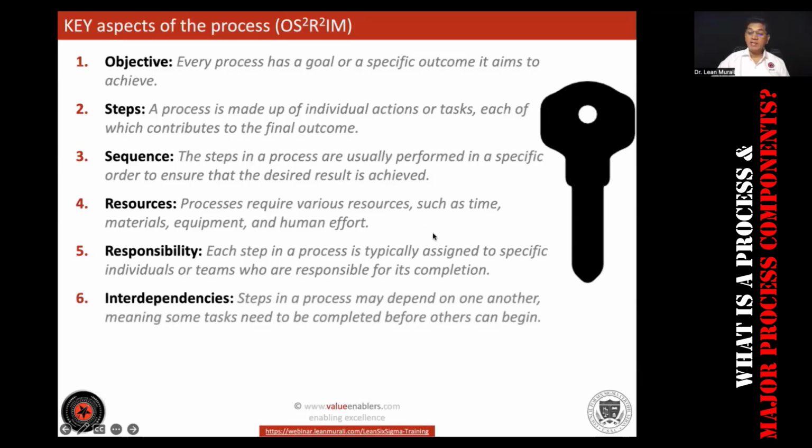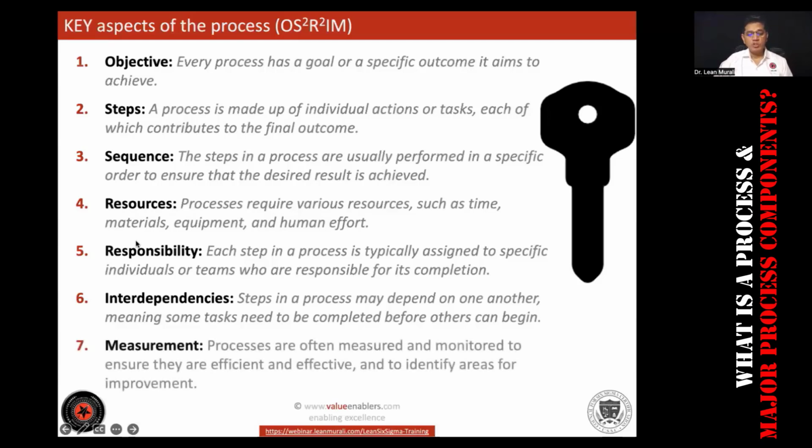completion. And interdependencies is a very important component because one step might be dependent on another. Some tasks need to be completed before the next task can begin. Like you can construct a wall only after the foundation is made. So the wall construction is dependent on the foundation. And the last but not the least, the very important one is measurement. The processes are often measured and monitored to ensure they are efficient and effective, and to identify the key areas of improvement.